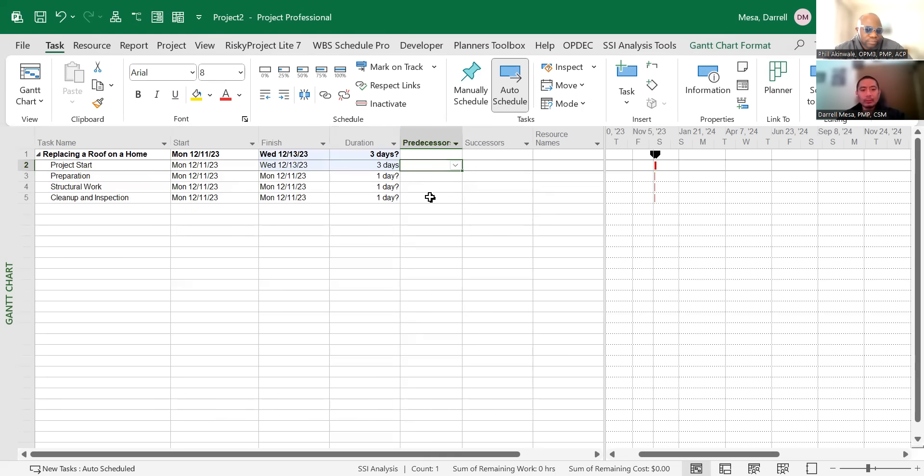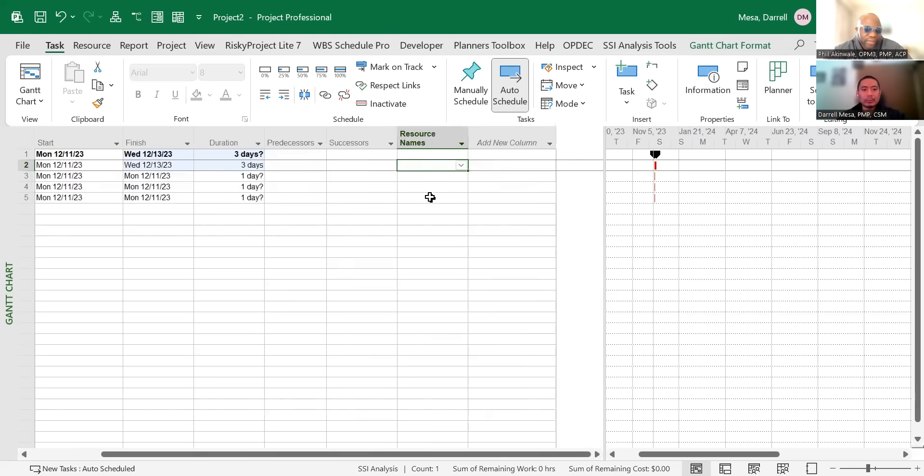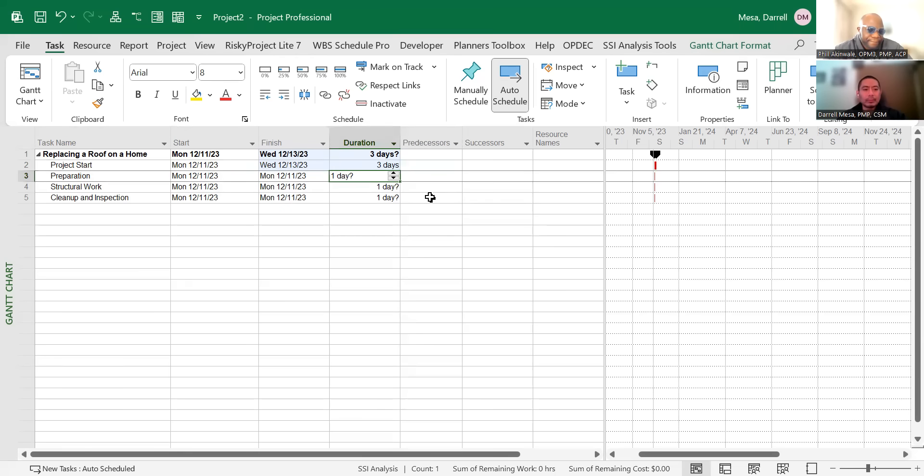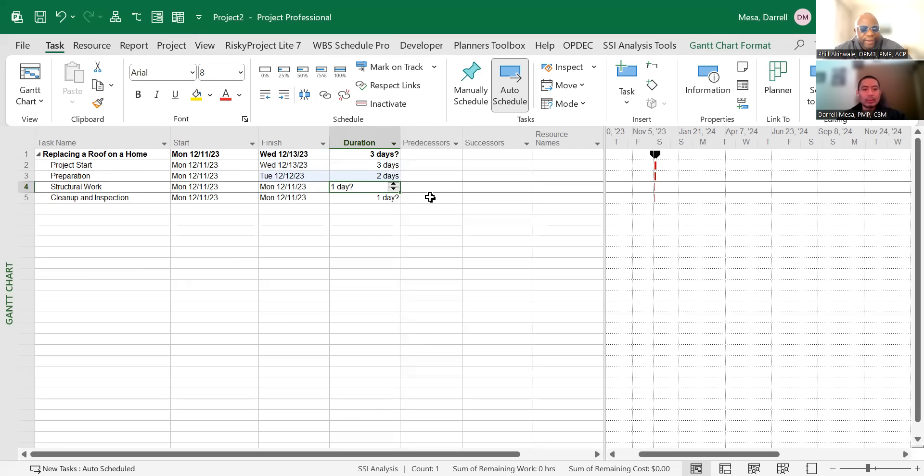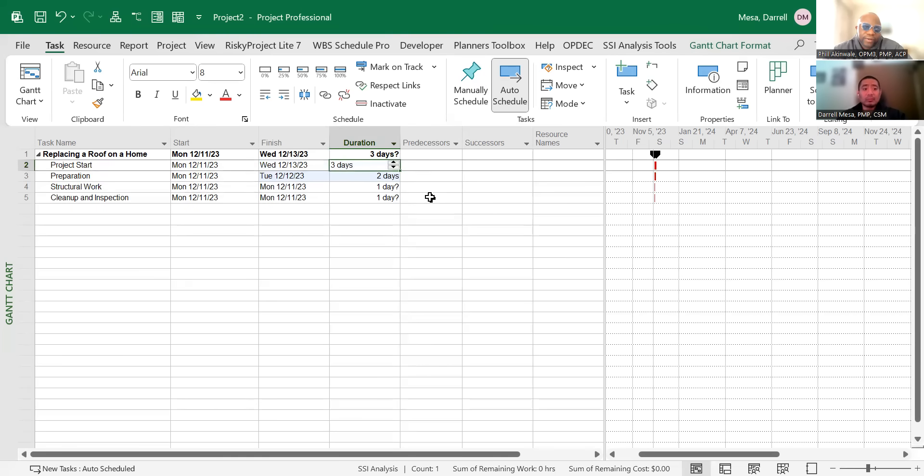From contract sign to the preparation, there would be some additional prep in the site and doing things like that. The moment you get into prep, we're not just talking about initiating, we're talking about actual executing type prep. So how many days would your prep be? For just the prep, probably just one to two days I would need. You see the technique Daryl used there? As a good scheduler, he took the higher end of the estimation window. I love more than just a single point estimate because as a good scheduler, what's the philosophy?